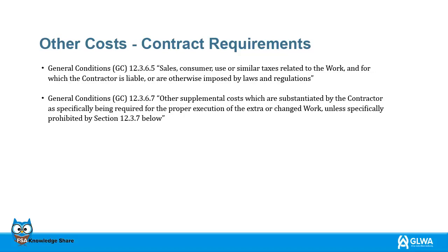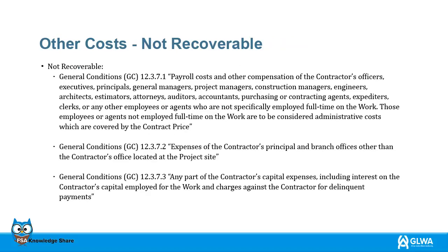General Conditions 12.3.6.7 Other supplemental costs which are substantiated by the contractor, as specifically being required for the proper execution of the extra or changed work, unless specifically prohibited by Section 12.3.7 below. The following slides will refer to specific sections of the contract which pertain to other costs, not recoverable. General Conditions